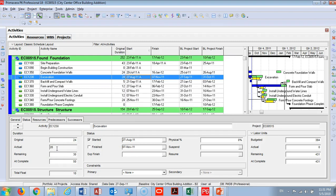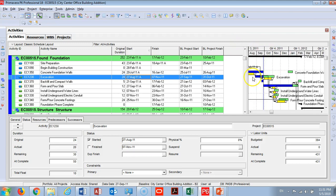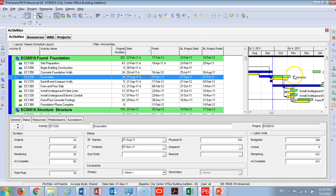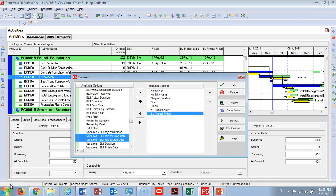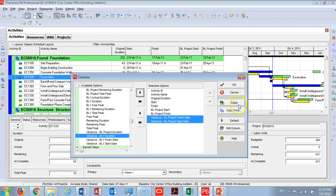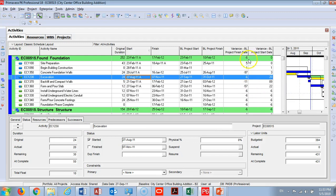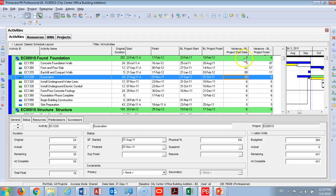I'll press F9 and you can see that this activity now shows it started, with a green bar indicating it's not yet completed. You can see the difference between the dates: the baseline shows September 27 but the actual date shows August 27. I'll add two columns — Baseline Project Finish Date and Baseline Project Start Date — to measure delays against the finish date. After applying, you can see this activity has a variance in the start date of 20 days and a variance in the finish date of minus 6 days.